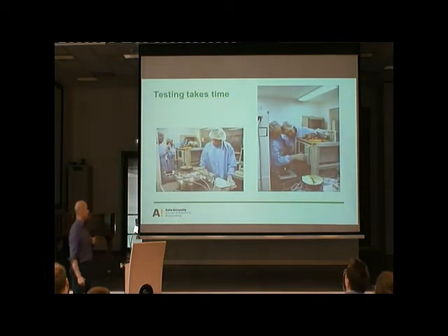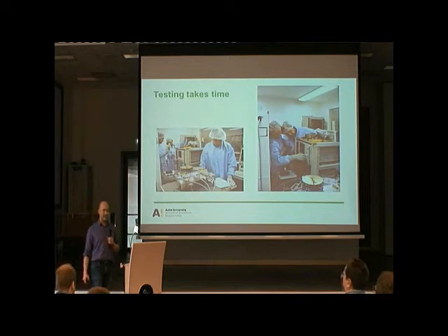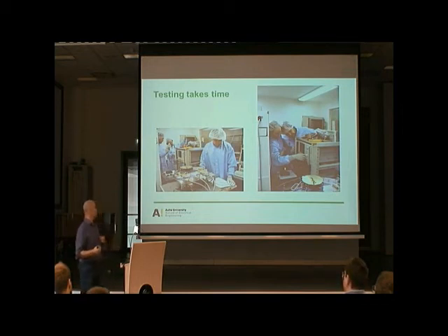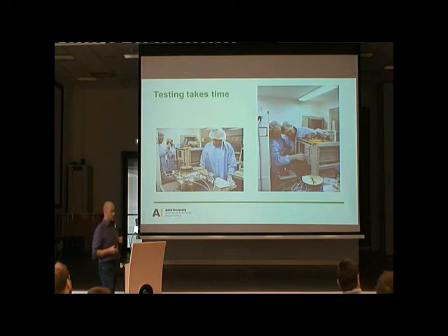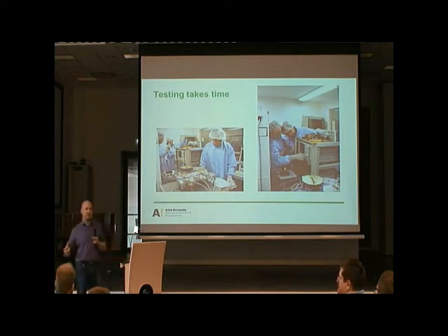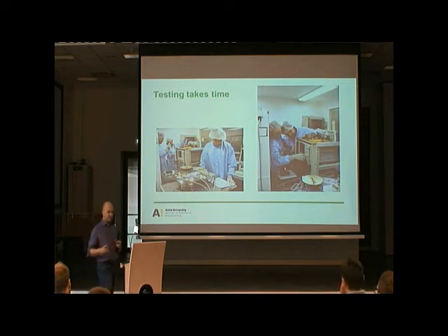Then you have to take into account that testing for a space project takes a lot of time. So even if you think that, okay, yes, let's build it, most of your time in a student CubeSat project you spend on building and designing, but you should also spend a lot of time on testing, because this is actually what gives you the guarantee that all these things are working. I don't have a slide, but another thing you should do is software. Software is also something which takes a lot of time, and normally somehow we are wired in a way that if we have the physical object, it's all right, then it's done. But actually it's halfway, because you need to also make the software.